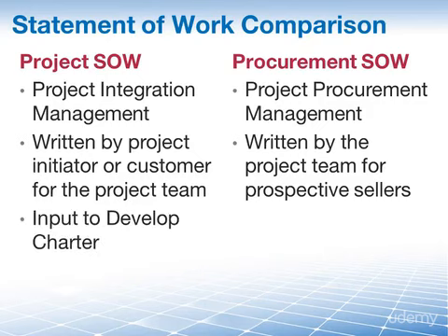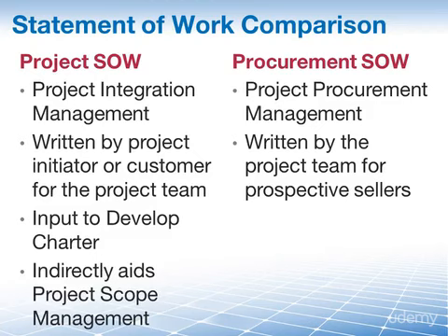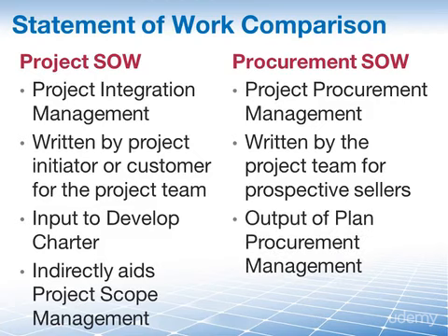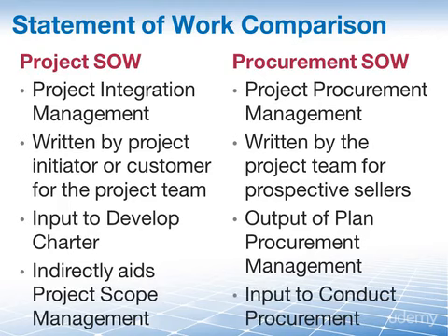And finally, they fall under different project management processes and knowledge areas. The project SOW serves as an input to the develop project charter process, which is under the project integration management knowledge area. As such, it indirectly aids in project scope management. The procurement SOW is the output of the plan procurement management process, and it is an input to the conduct procurement process under the project procurement management area. These differences between the project SOW and the procurement SOW should become even clearer when you go through the project